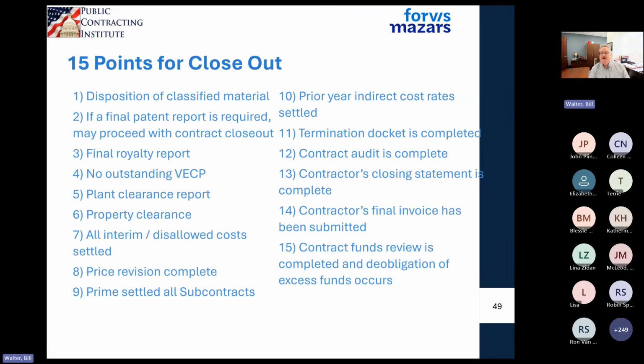So, and then Blessy, last question we're going to take today, asks, does a T&M contract need final rates before you can close it? And once again, it's going to depend on how your contract is written. So if you put general and administrative expenses on your materials costs, then chances are you're going to need to have that final rates before you can submit it, because you're provisionally billing a rate of X and your actual rate can be Y. So if you are not billing an indirect rate on top of your materials, if you're just billing your materials as a direct straight bill cost, chances are you don't need to wait for final rates.